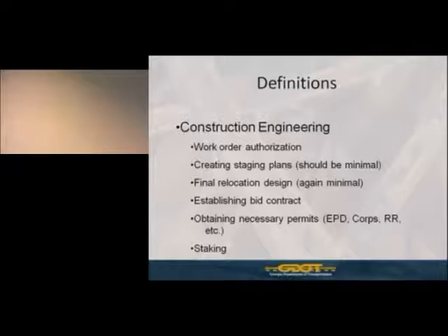Establishing a bid contract for local governments in particular, and some even private utility owners. If you plan on soliciting bids for part of the work, you'll have a time period in which you need to do that. That could be accounted for under construction engineering.